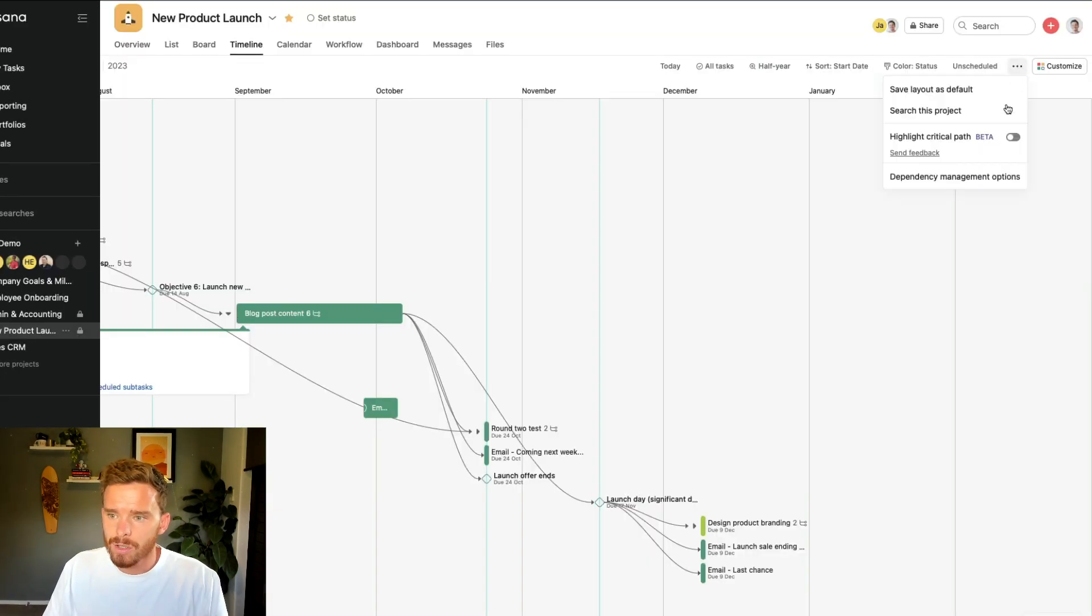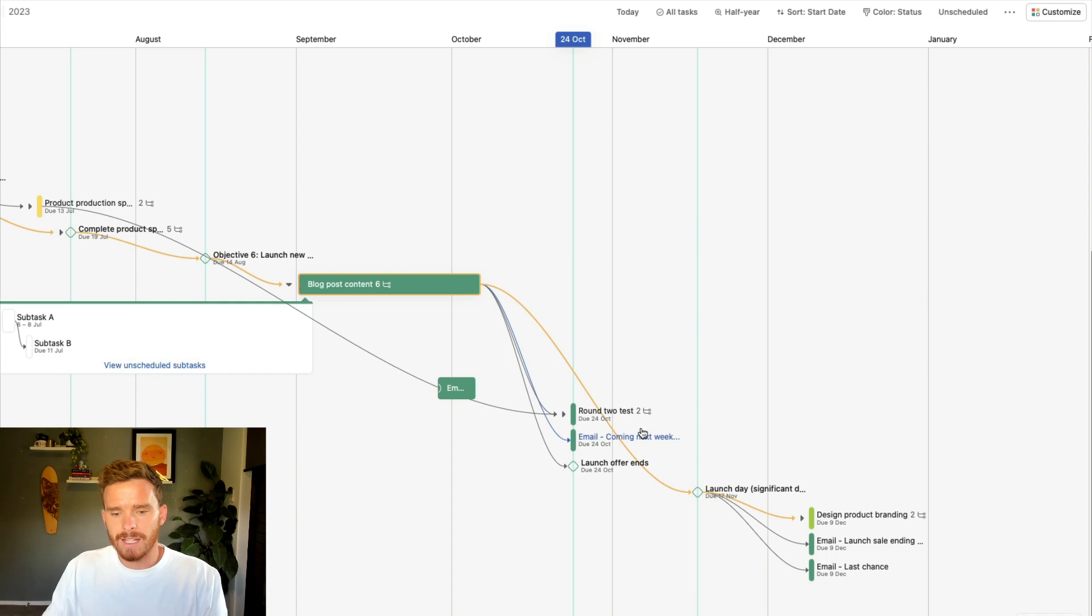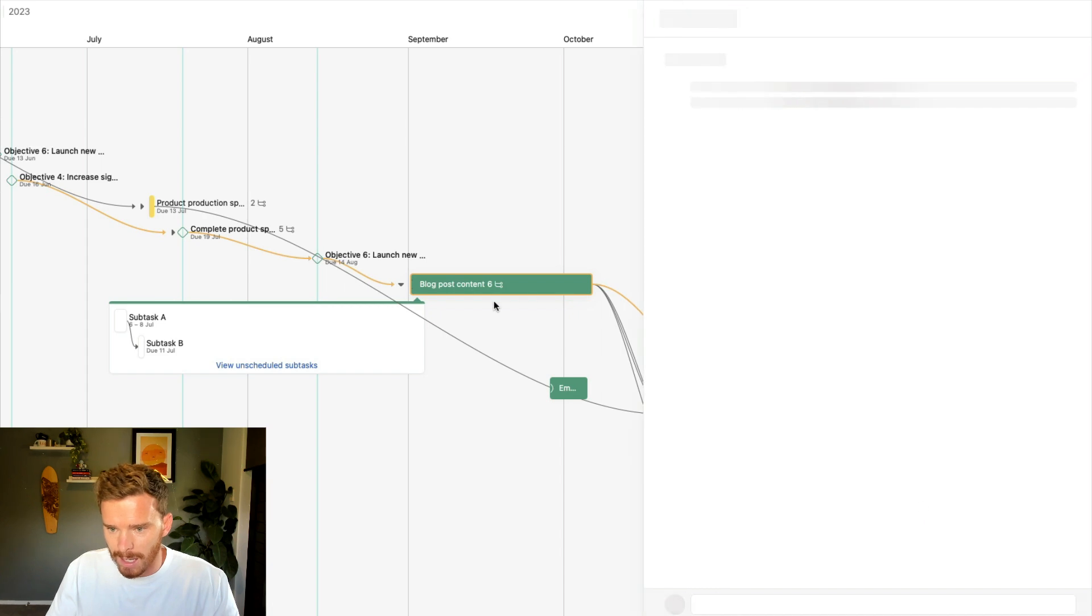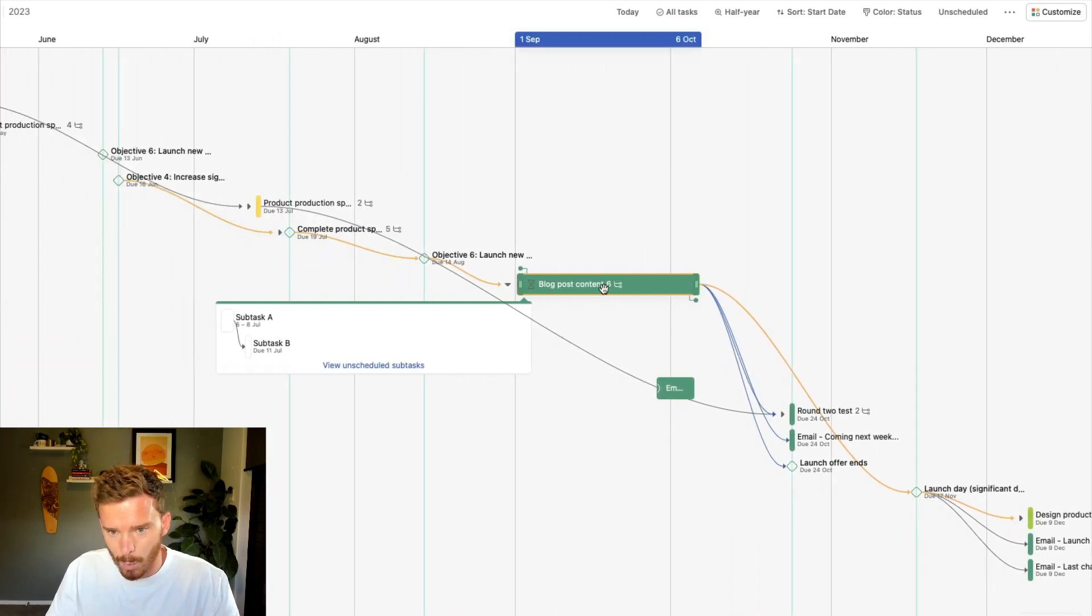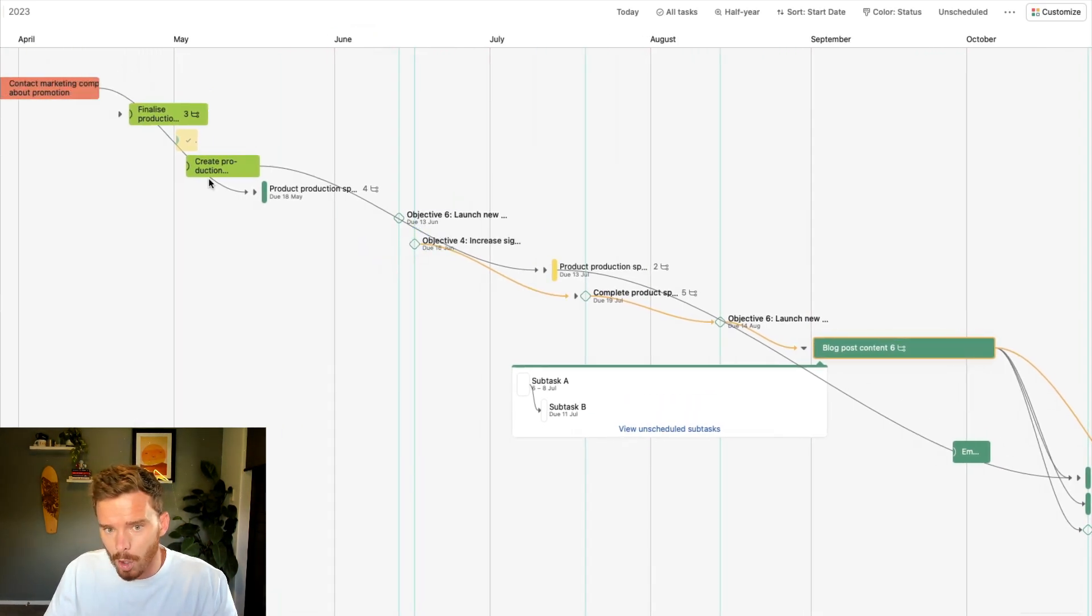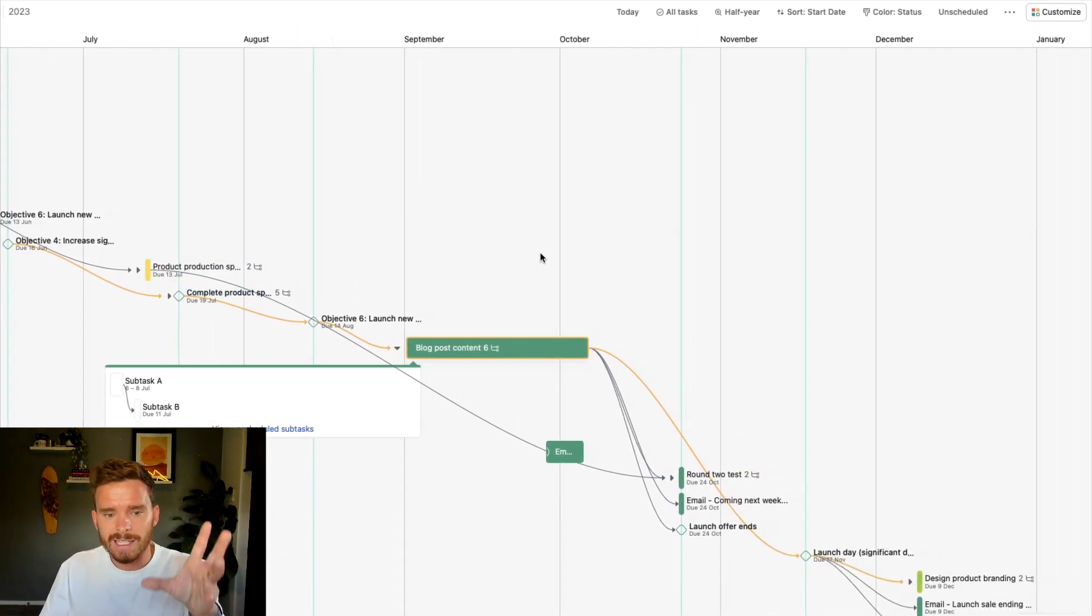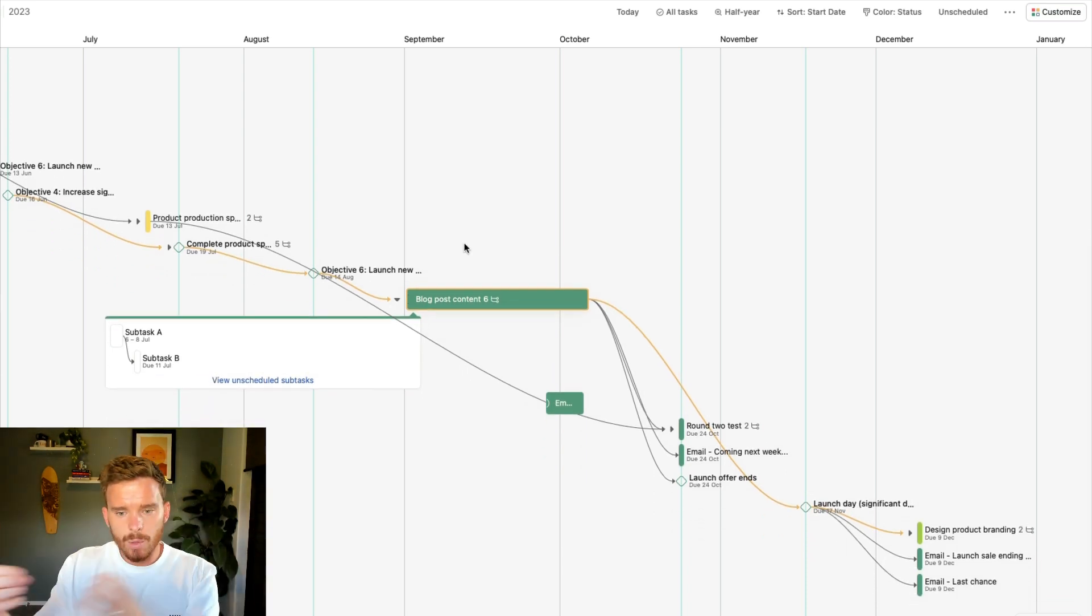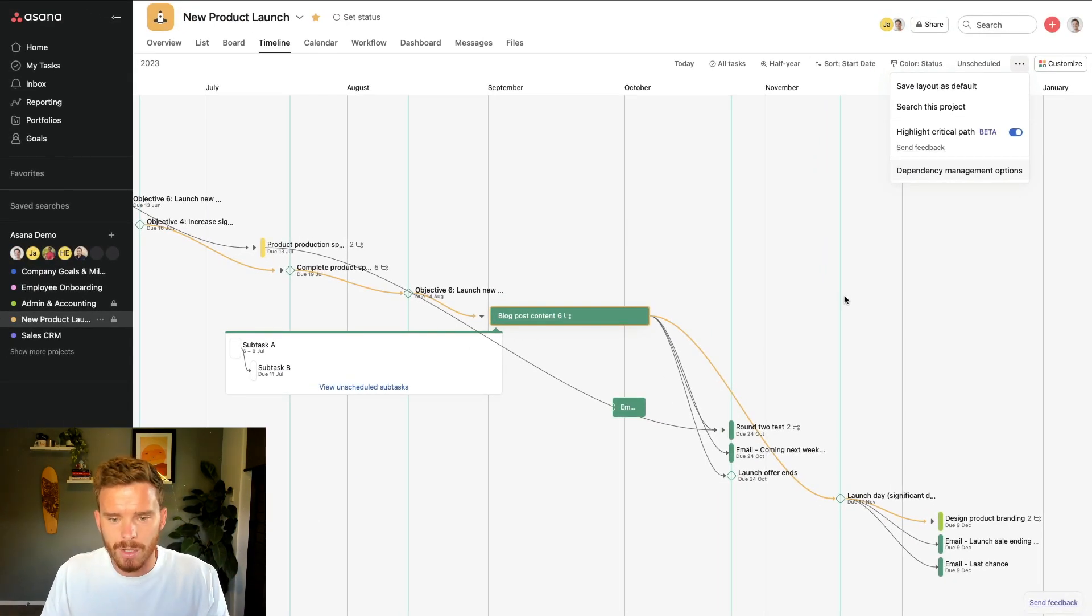Tip number six is that you can highlight the critical path in your project. What this is, is if you have a string of dependent tasks, the critical path is the sort of longest chain. So we can see there are a load of dependencies in here, but they're working backwards. This task here is dependent on this milestone, which is dependent on this task, which is dependent on this milestone and this milestone and this milestone. And that's where the chain ends. This milestone is not dependent on anything else up here. There are other dependencies, but that is the longest chain. And so that is why this is the critical path. This is the most important sequence of tasks that we need to work on.